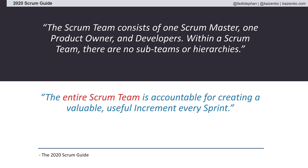Developers are accountable for delivering a working, usable increment each sprint. A product owner is accountable for maximizing the value of the product resulting from the work of the Scrum team. And the Scrum Master is accountable for the Scrum team's overall effectiveness.